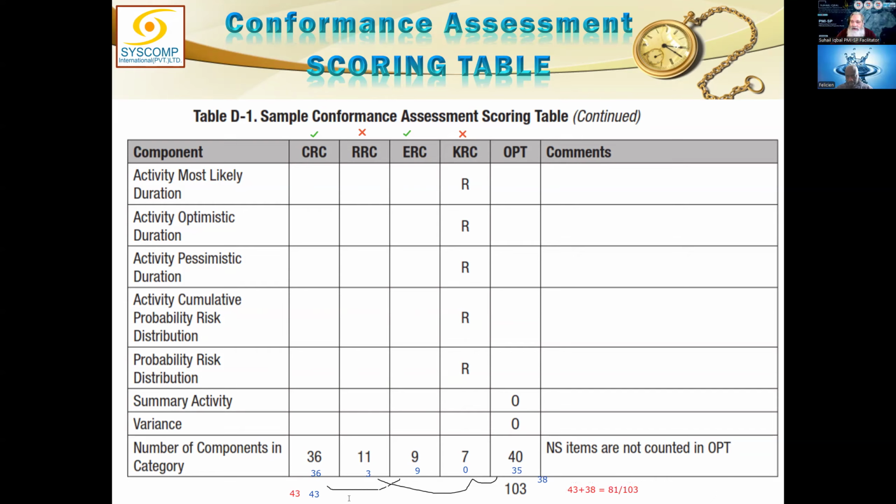So number one point is the required score you must achieve: 43 out of 43. Even if a single item is missing out of the required, then you fail. If you get all the 43 points, you are pass. But all additional points will raise your value. So you could achieve 81.